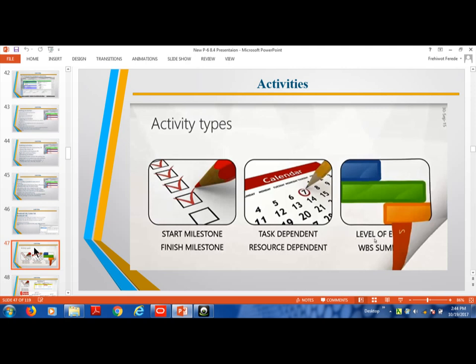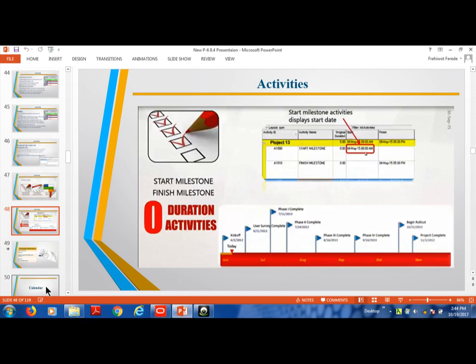The activity type Resource Dependent is also available. Milestone is zero duration — an activity with zero duration. An event is also zero duration. An achieved milestone is zero duration. For example: Phase One Complete, Phase Two Complete. Milestone is used to mark key project checkpoints with zero duration.